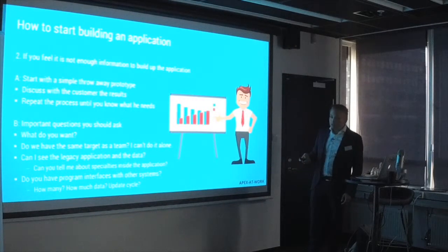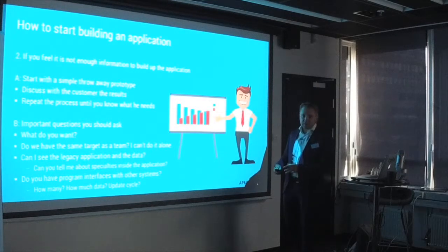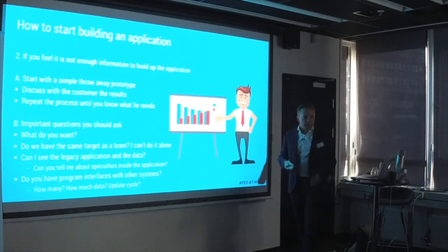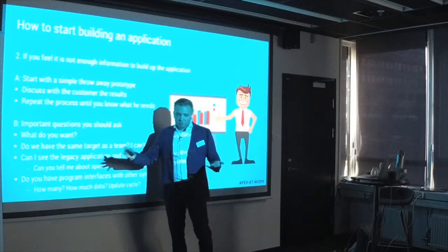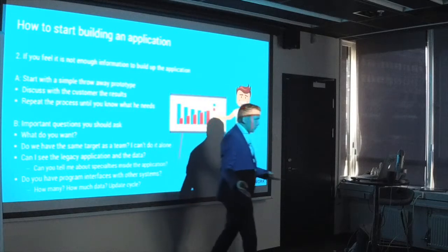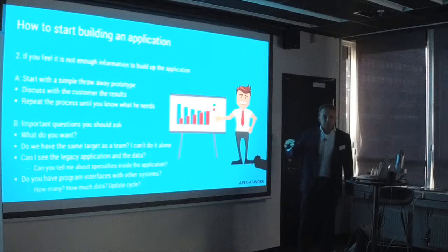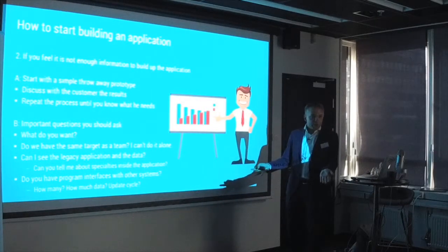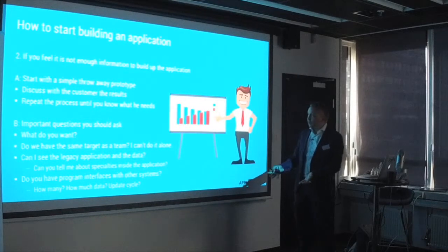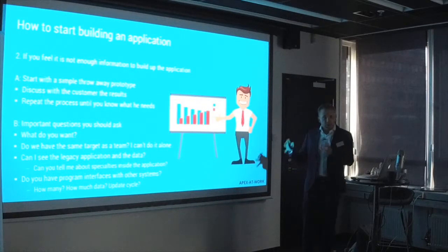And it has the advantage, in case you actually cannot solve it with APEX, which almost never happens, but if it is like this, then you maybe put in 5 days of work, and then you find out it's not possible. In that case, you can stop the project instead of putting 50 days of work into a project and finding it out then. So show the customer your prototype and discuss on this prototype.